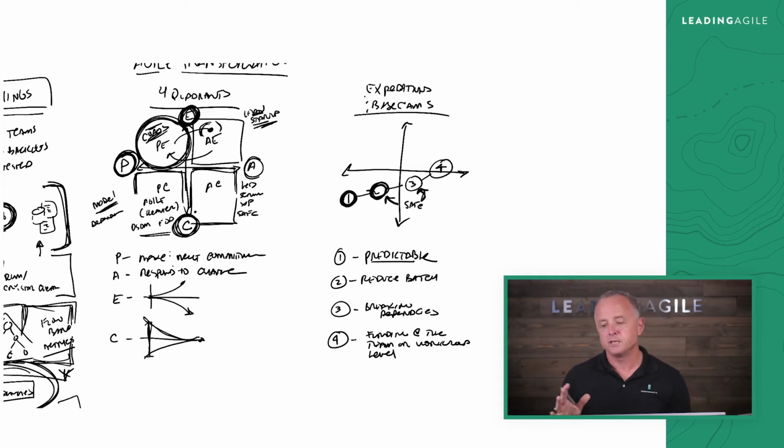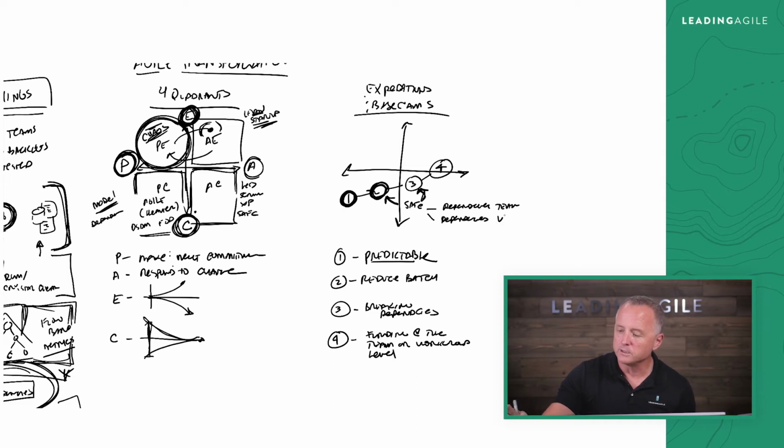But where SAFe implementations often struggle is within a value stream, dependencies between teams. But then you also start to see dependencies between value streams. And whenever there's dependencies, that reduces agility. And so what we often observe is that you form the teams, you put in the compensating controls, you're getting better at reducing batch size, but the dependencies are creating volatility in your ability to deliver, right? It's really difficult to make and meet commitments. And so when you're talking about Basecamp 3, we're talking about breaking dependencies, right? So these teams or value streams or work groups can operate more independently.